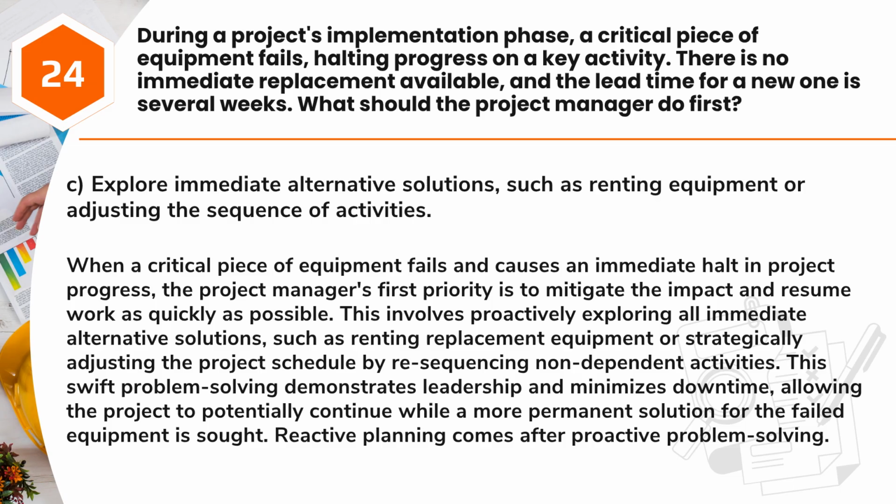This involves proactively exploring all immediate alternative solutions, such as renting replacement equipment or strategically adjusting the project schedule by resequencing non-dependent activities. This swift problem-solving demonstrates leadership and minimizes downtime, allowing the project to potentially continue while a more permanent solution for the failed equipment is sought. Reactive planning comes after proactive problem-solving.